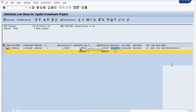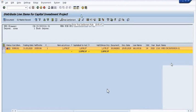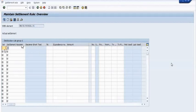We need to transfer or capitalize this cost to the respective assets. Select this cost item and click on final settlement.